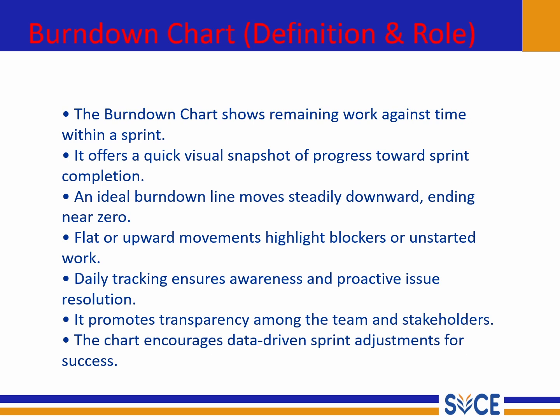But if the line becomes flat or even goes upward, that's a red flag. It means something is stuck, maybe a task has not started, or there is a blocker preventing progress. So these visual cues help the team respond quickly rather than discovering the issues too late.